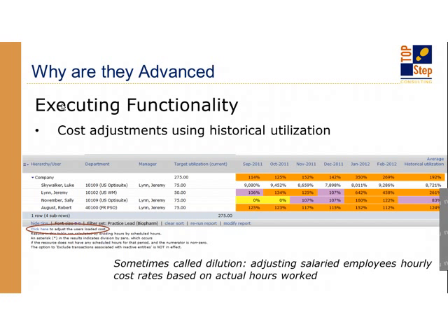So what this option to adjust the user's loaded cost does is enter a cost rate into the user profile, so it creates a record there. Now, this can be used to dilute up and down. If you had that 40-hour employee that only charges 30 hours that week, or only enters 30 hours that week, their cost rate would go up because you're still paying them for a 40-hour work week.